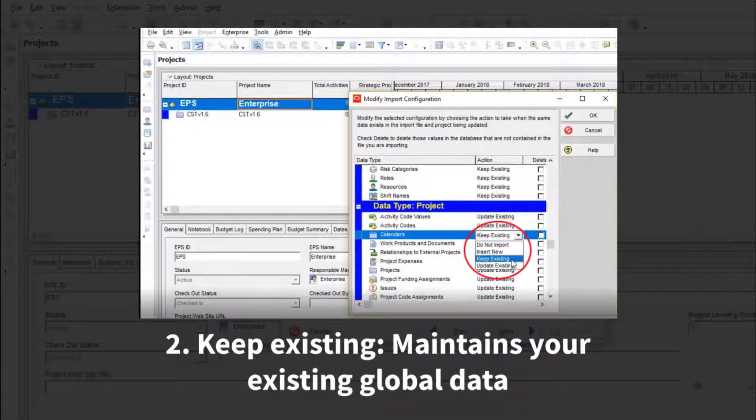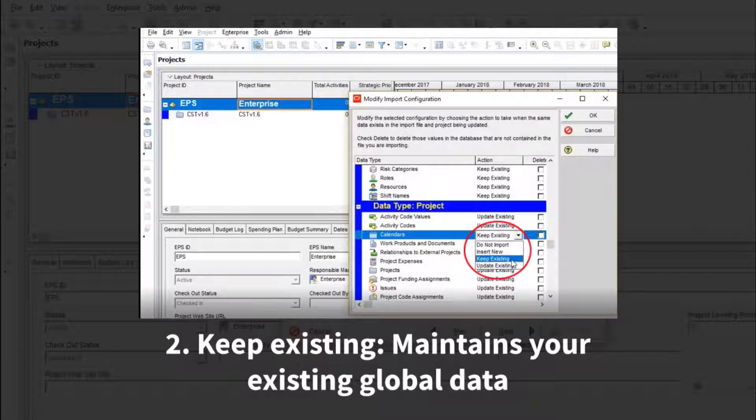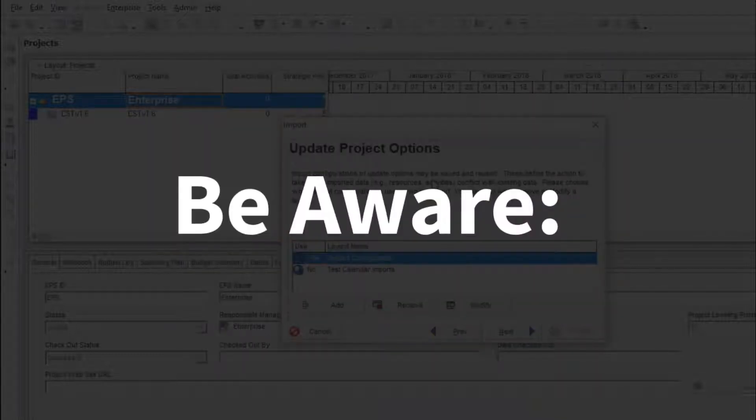Alternatively, you can have your database ignore any differences in the imported schedule's global calendar and simply use your existing global calendars. This preserves your database but it means that you may be seeing different dates on your schedule when compared to whoever provided it to you. Neither of these options are ideal.